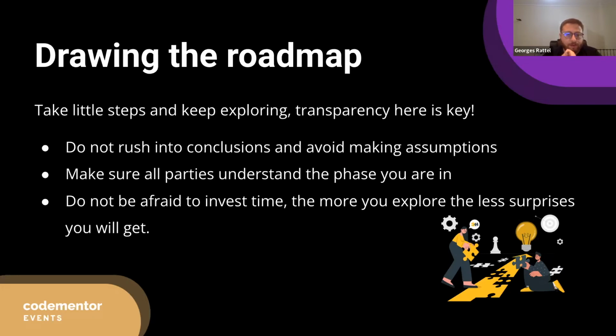So it's very important to make sure that, okay, in which phase of the project are we now? What are we really expecting feedback on, and when is it even over? So until when do we keep expecting feedback? You cannot expect feedback on the login page at the end of the project, and then change everything from there on. So that's very, very important.